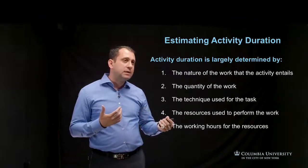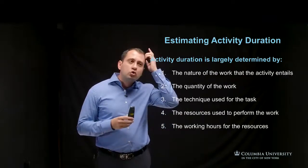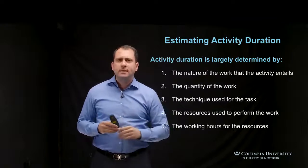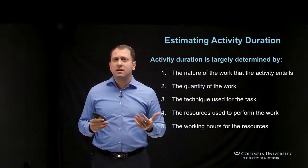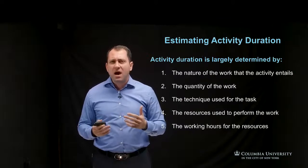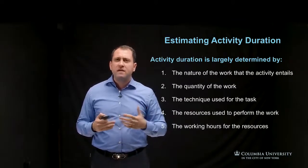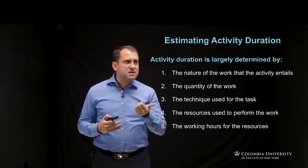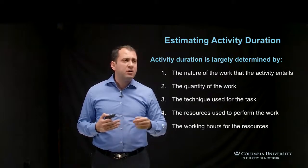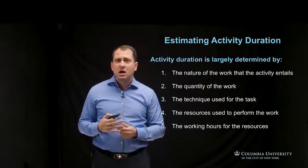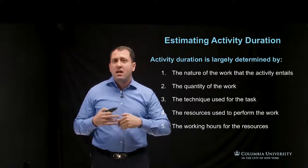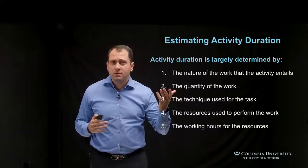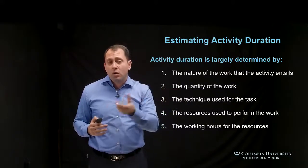Number four is the resources used to perform the work. For example, 20 masons will most likely finish the same amount of work faster than 15 or 12 masons. Another example: a larger fleet of scrapers will finish an earth-moving operation faster than a smaller one.